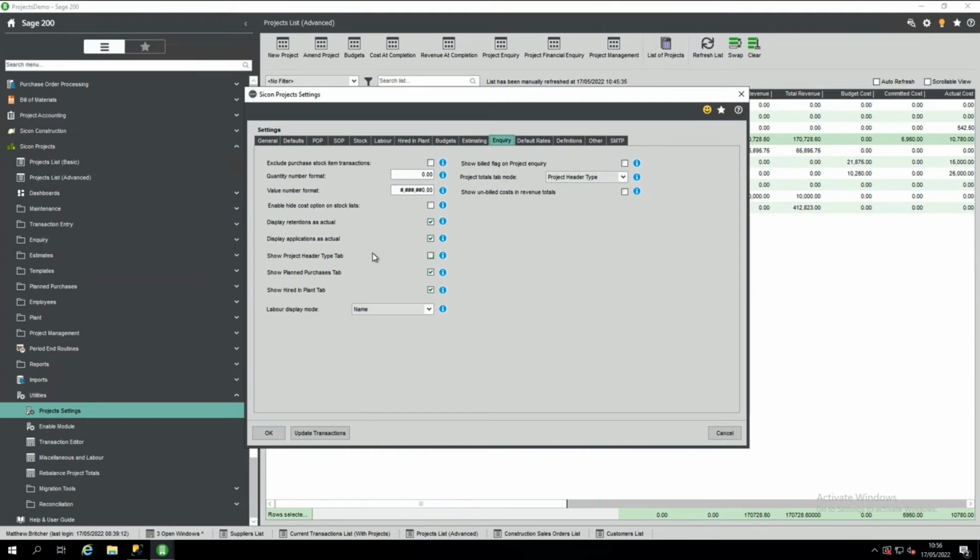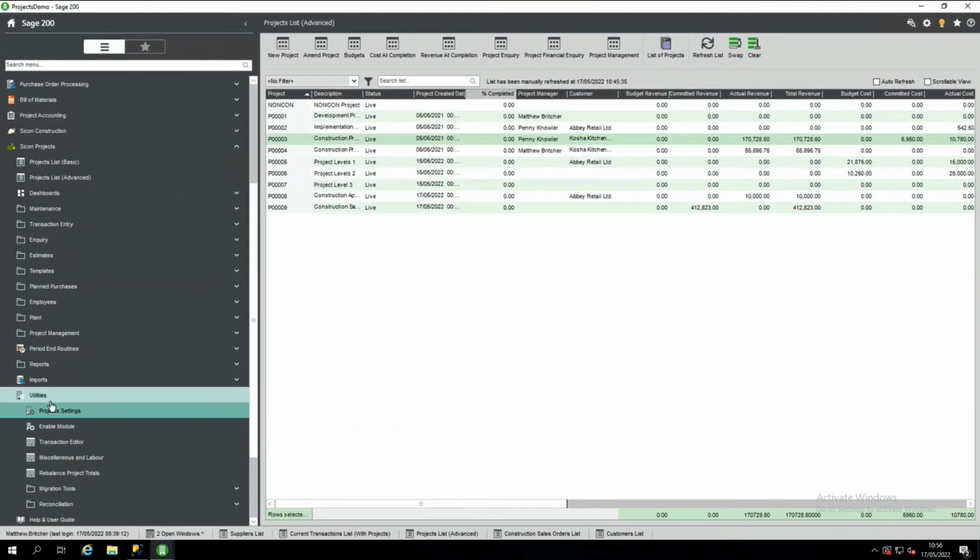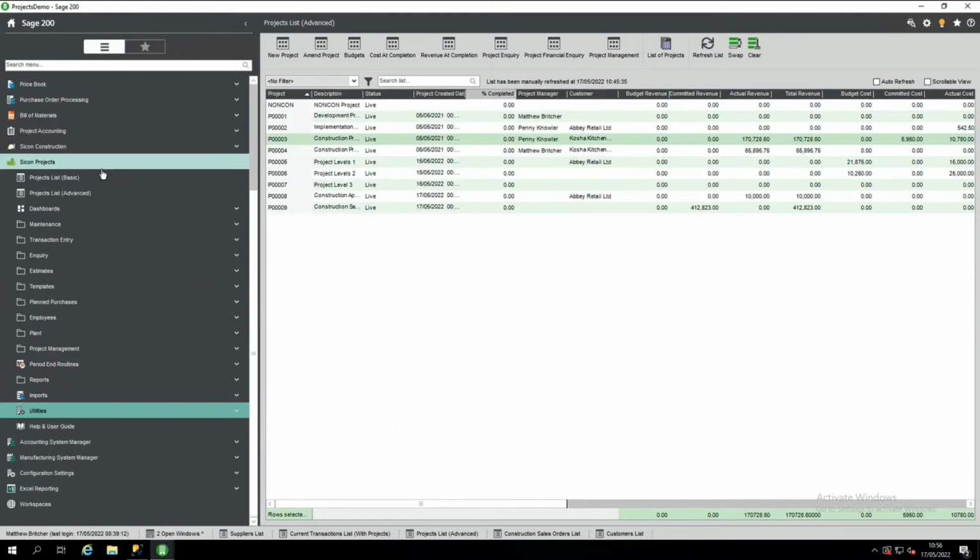Okay. I mean, that's perfect if you could just put the whole lot on in one go. So someone's raised that application in a spreadsheet, they've got it agreed, you've got a certificate, and then the whole lot just gets processed. What we're allowing for here is someone raises an application. It may take a couple of weeks before it gets valued, even longer depending on the cycle for reviewing them. So it's really a matter of having that on your management accounts with the applications being raised and recognised, even though that invoice isn't likely to get raised maybe until the following month. So not everybody wants to do that, but there's certainly a lot of people who find that really useful.